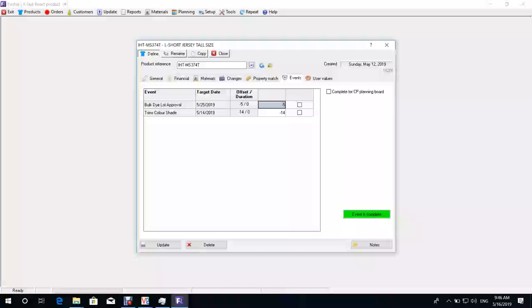Okay? Do we set a lead time for an event once and it reflects on all orders? Yes. So if we have to get the approval for PP samples, for example, 7 days before production, it reflects to all customers? Yes, depending on how you want it. You can do it for all customers, or you can do it for individual customers. How can we do it for individuals? You would create a new template, like I said.